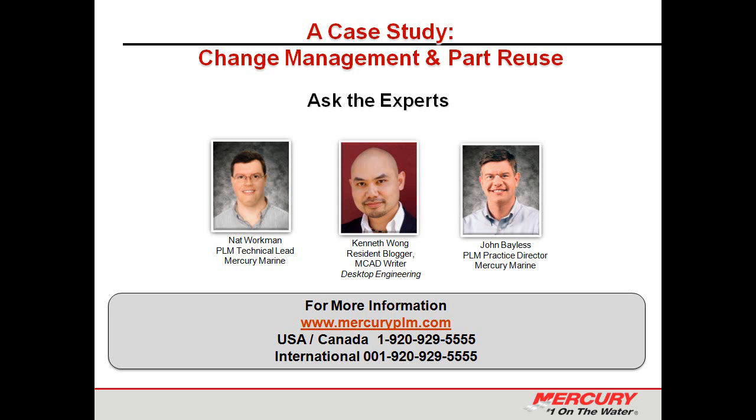Of the 22 days to process a change, how many days are used or needed to authorize or approve the change? Can you repeat the question? How many days are needed to authorize the change? Okay. Of the 22 days to process a change, how many days are needed or used to actually authorize or approve the change? Probably about 5 days to actually get through the authorization process.